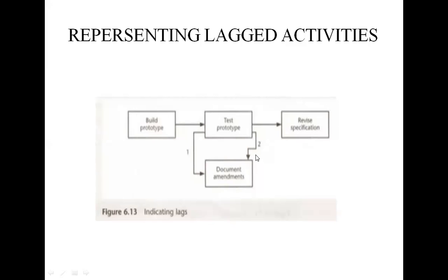So document amendments will start one day after the test starts, and finish two days later, after the test ends. Here we have the activity test and document amendments. This would generally start one day after testing has begun and finish a little after completion of testing.